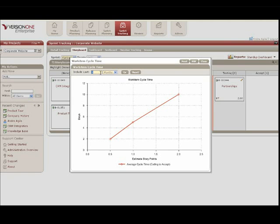The cycle time report — I think someone asked how do you know when you're getting better. Cycle time is probably one of the things you would look at to say we're getting better. That alone is probably one of the essential metrics that tells you you don't have a lot of bottlenecks — think of it as velocity per feature per estimation level. You should treat this measure like velocity. And it's not set in stone — it's very much a yesterday's weather approach. We got 10 points done in this iteration, so it stands to reason we should put 10 points in the next iteration. Cycle time is very much like that.